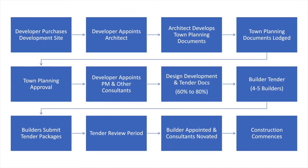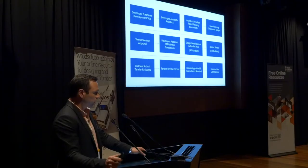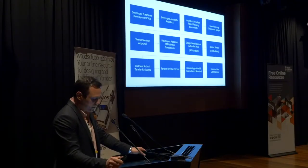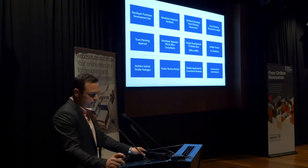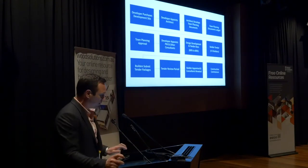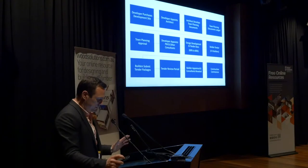They try to find four to five — sometimes six or seven, sometimes three — but on average let's assume four to five builders. That gets tendered over a four to six week period. The builders submit their tender packages, which are then reviewed. A builder is appointed, and then the critical part: the consultants are novated to the builder. The builder takes responsibility for delivery of the design, and then construction commences.